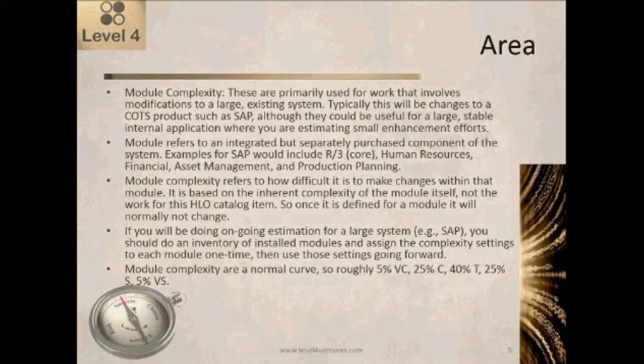If you would be doing estimation for a large system, for example, SAP, what I recommend you do is do an inventory of the installed modules, which is normally not that difficult to get, and then assign the complexity settings to each module one time, and then use those settings going forward. So you would do the inventory, you would sit down with the developers who are at least somewhat familiar with the modules, you would use the Delphi technique or some other kind of brainstorming approach, assign a complexity to each one, and then that becomes the set of complexities that you would use.